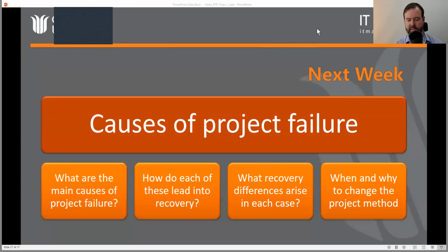And you're meant to have a release plan that says, all right, this number of sprints will deliver this capability and this number of sprints will deliver this. And you leave room for the fact that you're going to learn a lot as you go, and you may change a lot of that as you go. But the difference is that's not considered broken. It may be considered challenging. It may be considered different. It might actually be fairly smooth.